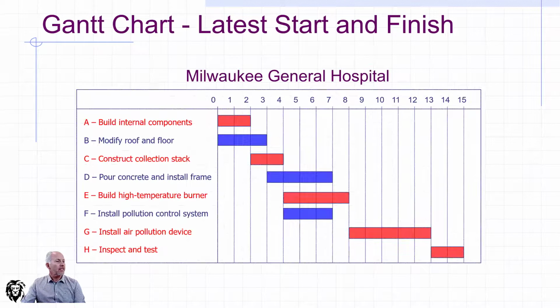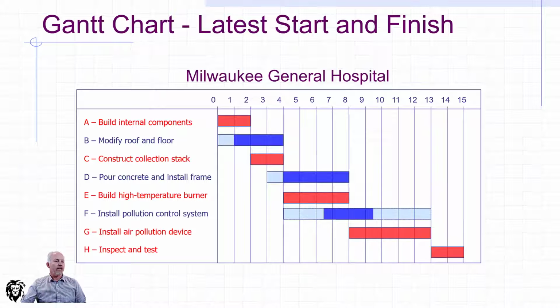And so here we have this set up, and to plot that, again, only looking at the non-critical activities, I'll start at activity B, and if I shift it to the latest start and finish, but keep the information of where the earliest start and earliest finish was, you now get the idea of what room it has to move without affecting the critical activities around it. And I tend to think of it almost as a little slider. So I can now slide activity B within that range from 0 to 4 without affecting the critical path. And let's do the same thing for activity D. And activity F had a lot more slack. And so you can see what room or flexibility, what maneuver room you have in scheduling the non-critical activities without affecting the critical path.